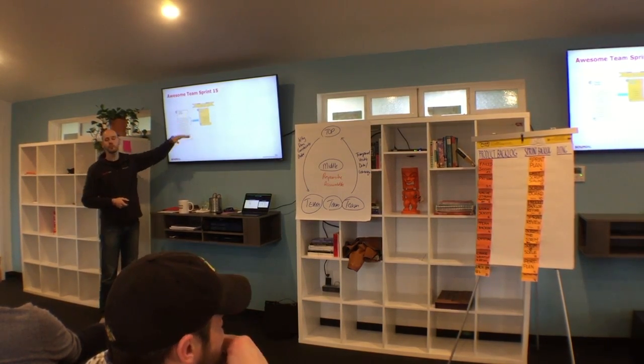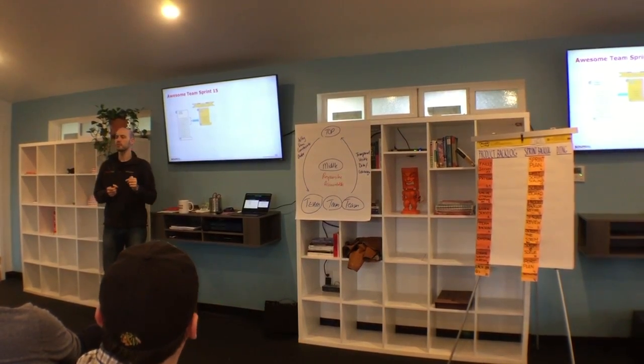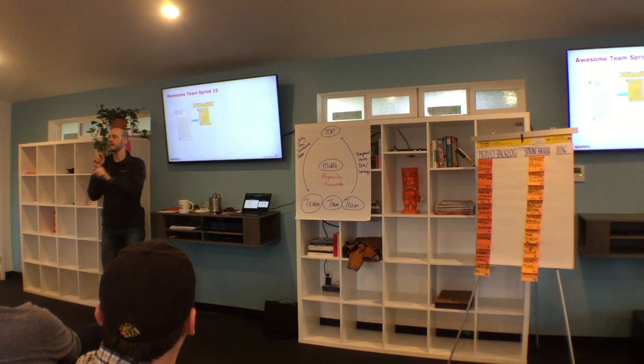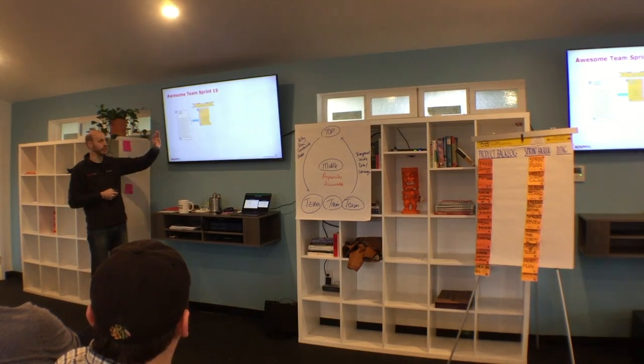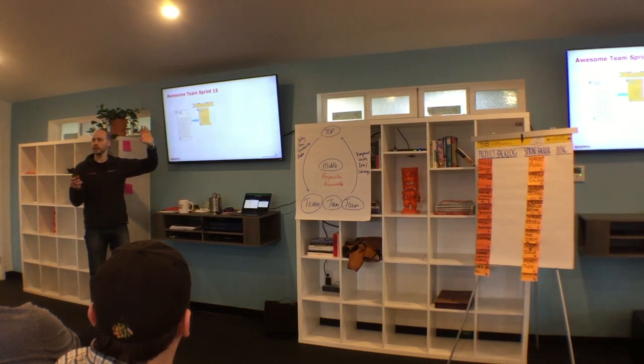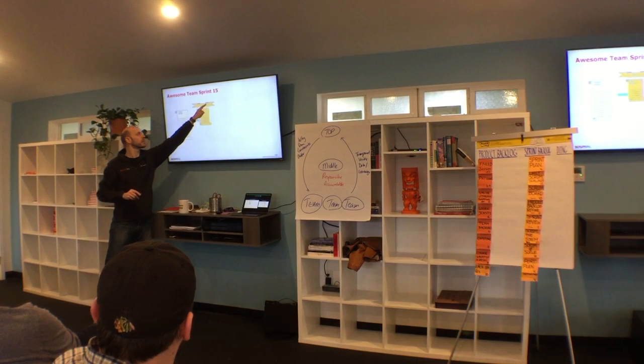The team will inform the product owner of their technical dependencies. I understand you want to switch these items, product owner, but this step really has to come before this step. They'll have that conversation here in sprint planning. But the bulk of estimation's already been done. So it's not an estimating meeting, which I see a lot of newer coaches and trainers say, but that's not the highest value of this time. It's to discover a sprint goal.